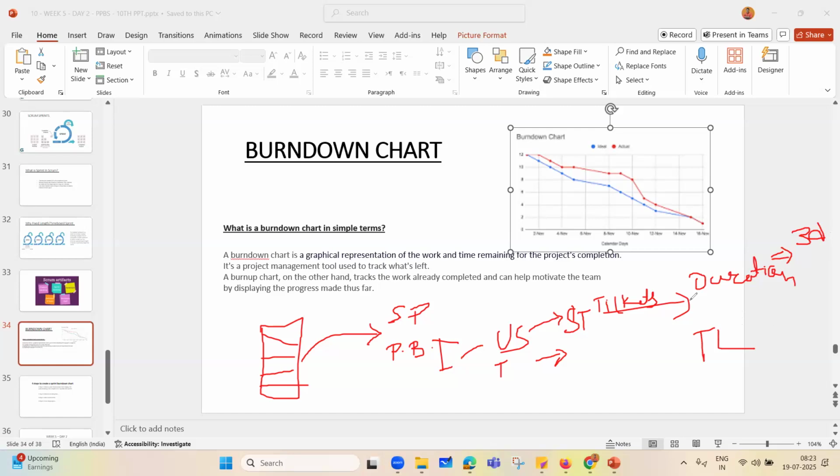Now every single day he is working on multiple tickets, and the time logged goes around 2 hours or 3 hours or 4 hours. This is how they track every single ticket, how much time they are working on it. The moment they log the time against the duration, the time remaining will be visible in Jira or the project management tool by default. Possible?